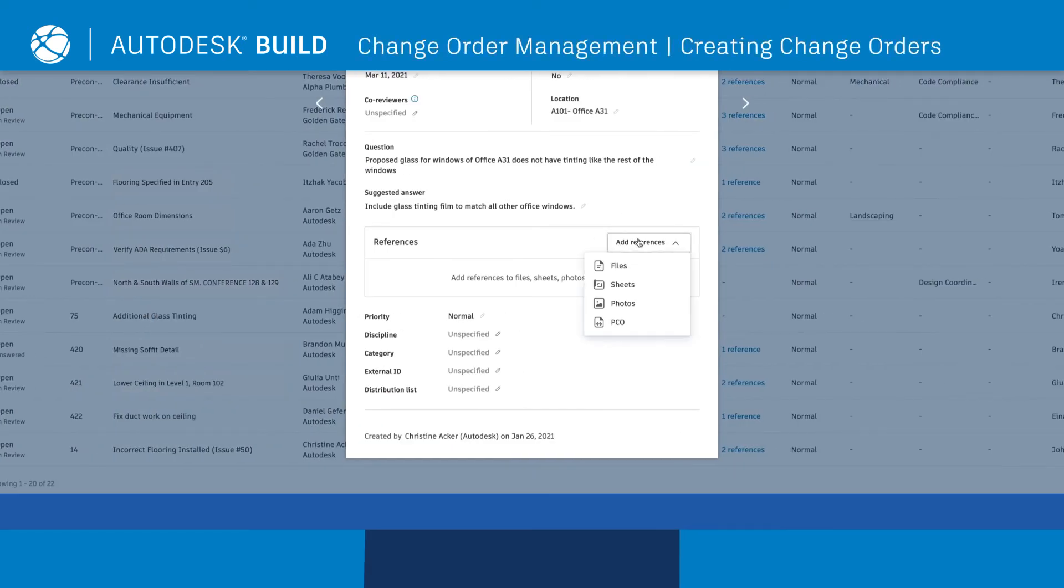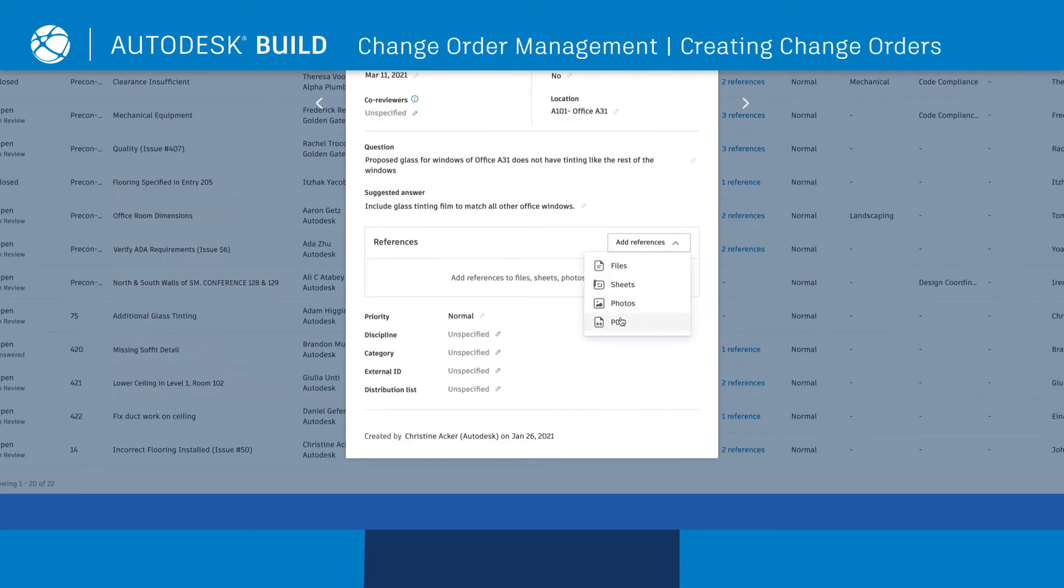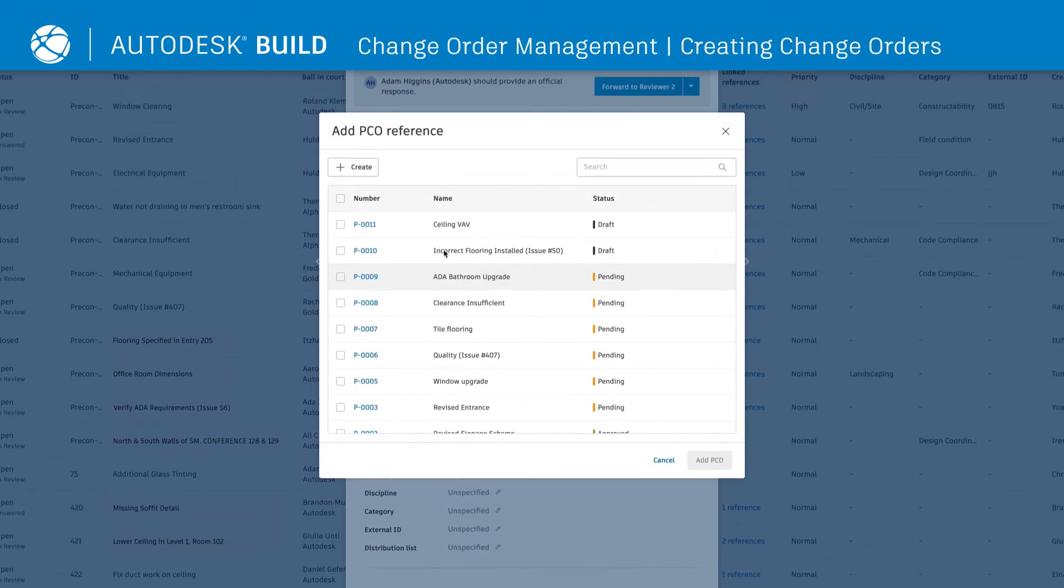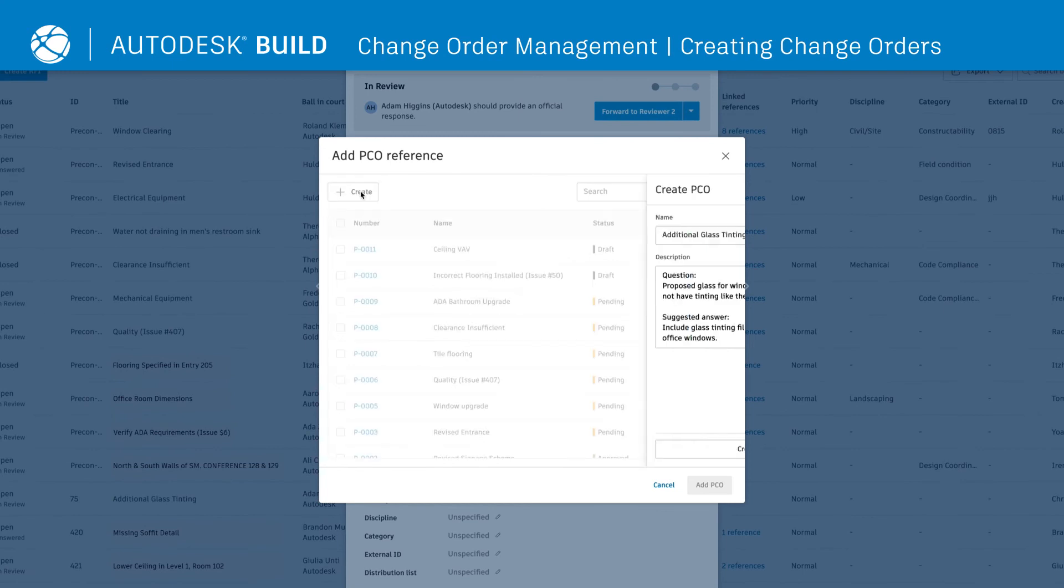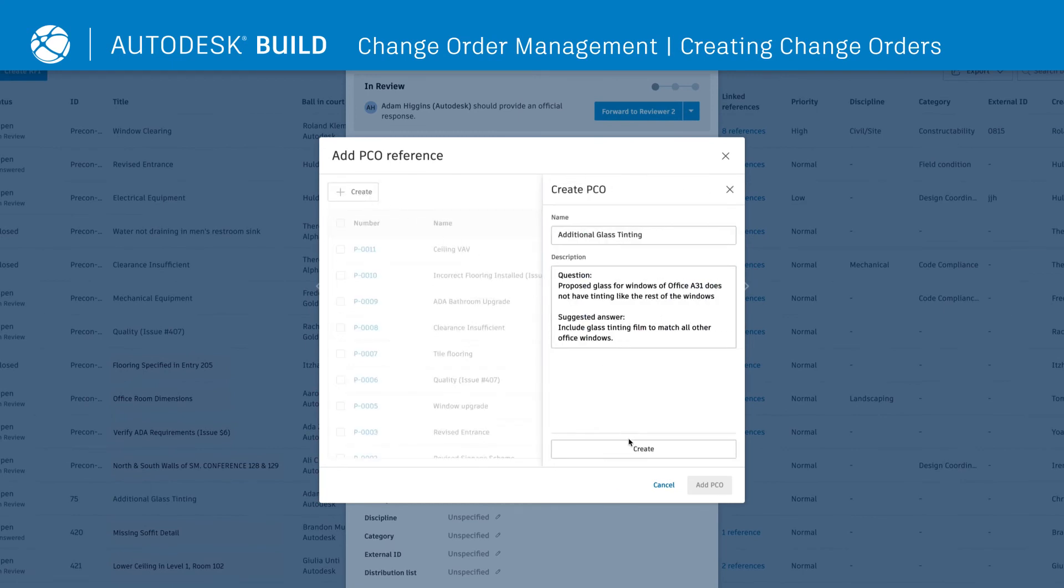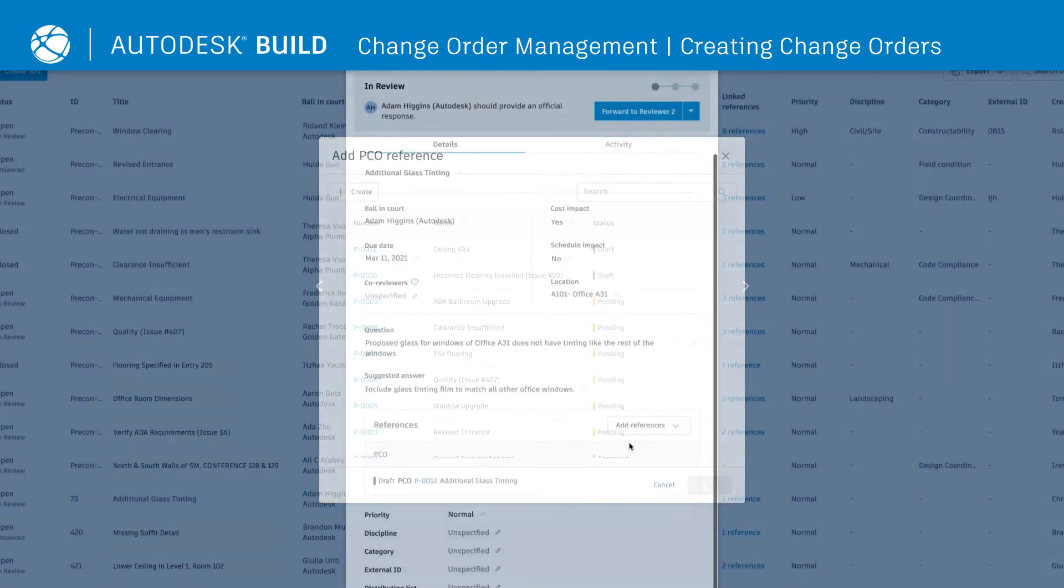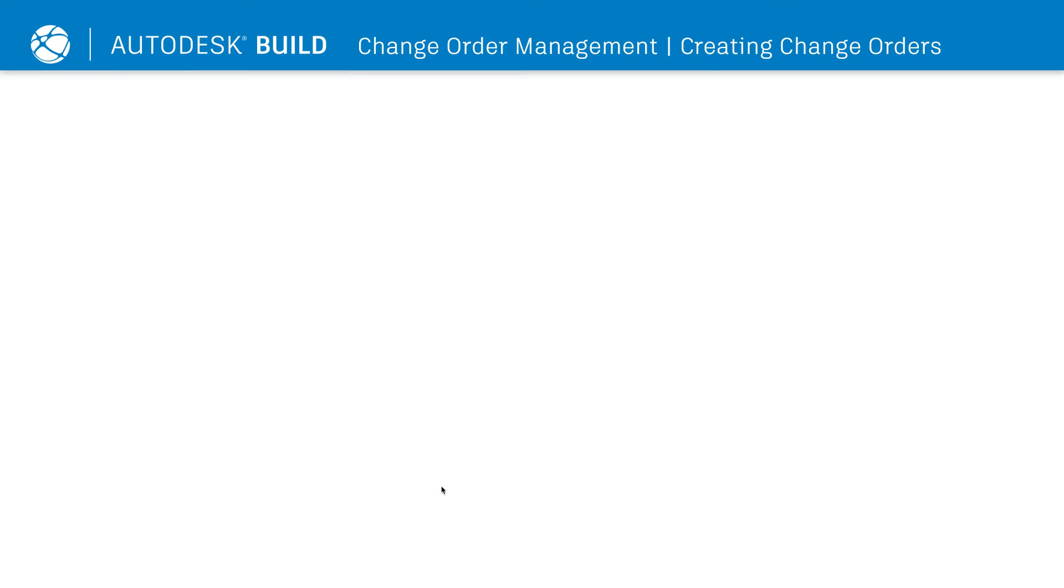Since RFIs often lead to a potential change order, teams can create a PCO directly from an RFI, providing context for the origin of the change order.